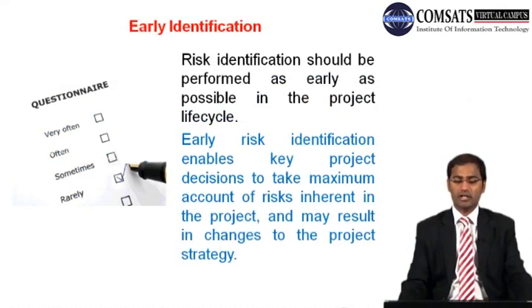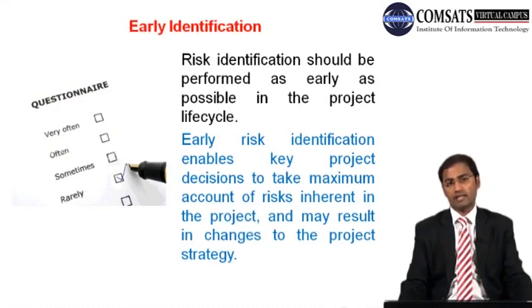And early identification. While we were talking about risk identification, there are 3 types of identification. So we are going through these. Risk identification should be performed as early as possible in the project life cycle. So early risk identification enables key project decisions to take maximum account of risk inherent in the project and may result in changes to the project strategy.